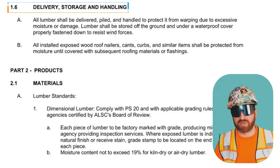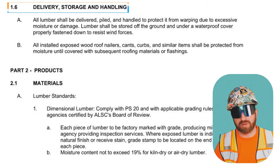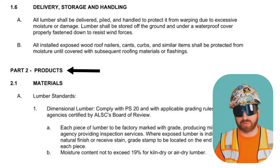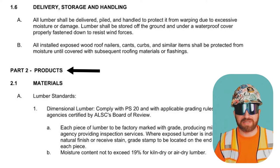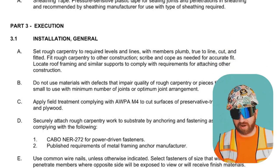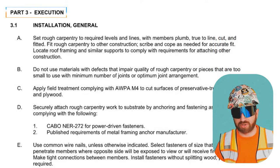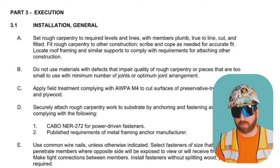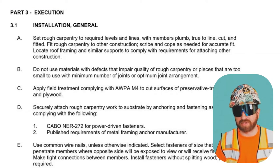Section 1.6 talks about delivery, storage, and handling of the material. Then we get into part two, which is products and materials — going in depth into which products and specific materials we should be sourcing for this building. And then finally, part three, the execution — how to actually go about installation, and furthermore if there is testing or owner training required as part of this section.